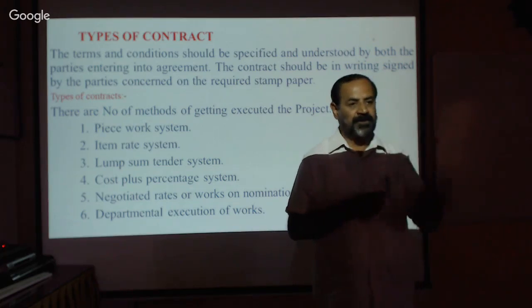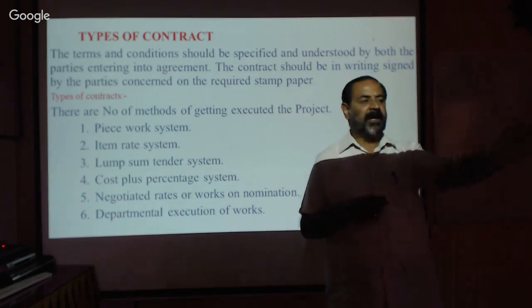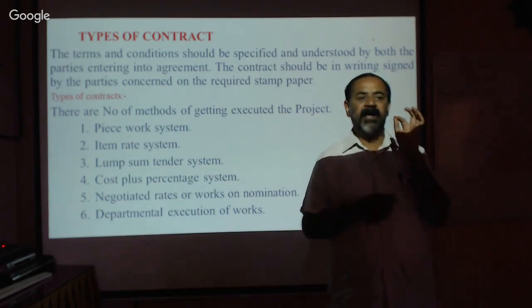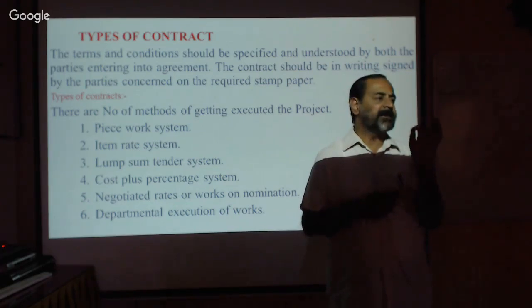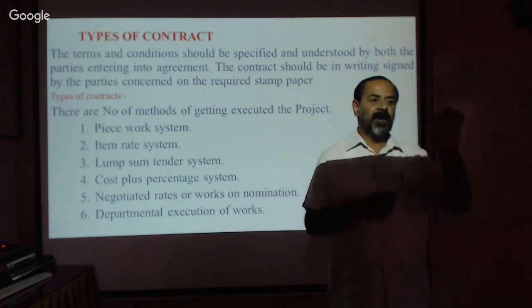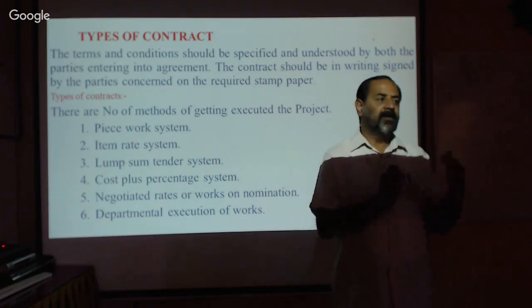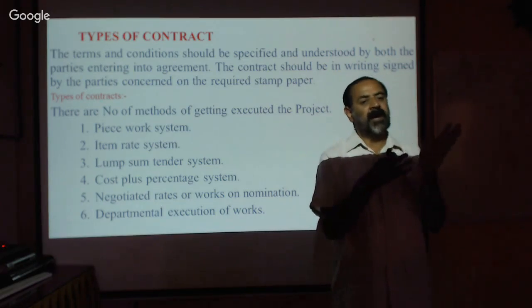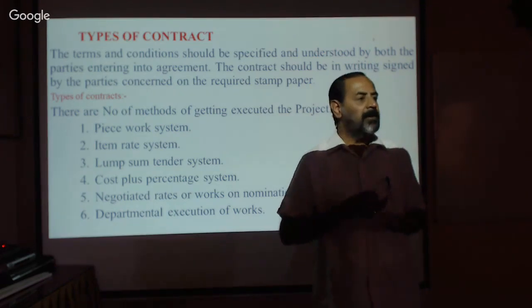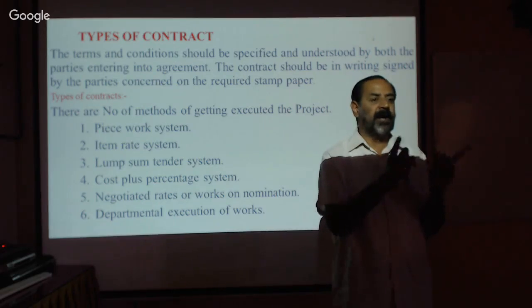You have to manage the accounts. Most important thing, the material cost, that is the main cost, then labor, masons, carpenters, whoever works for that period, you record their salaries. Then total it weekly or sometimes monthly, according to the agreement between the owner and the contractor.